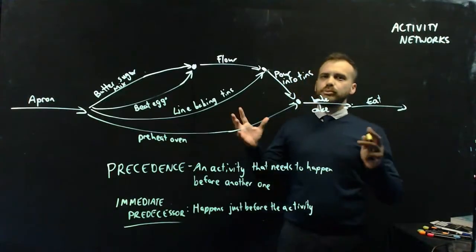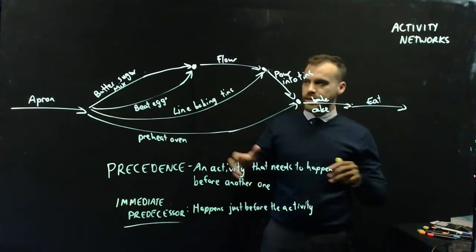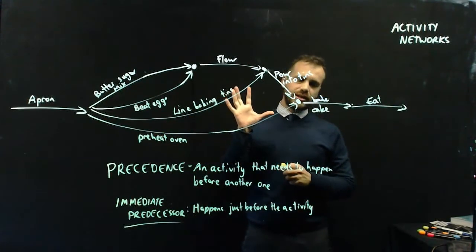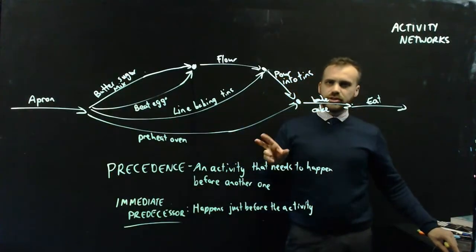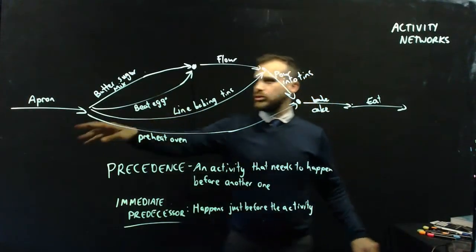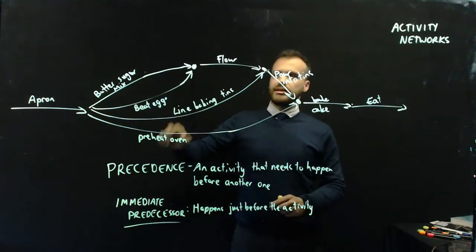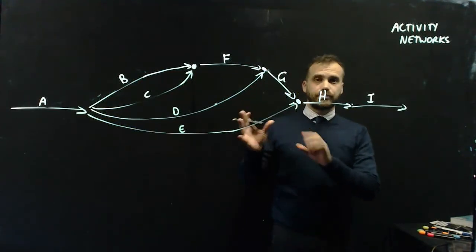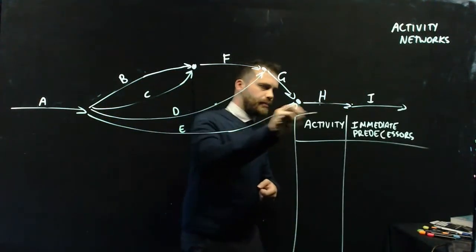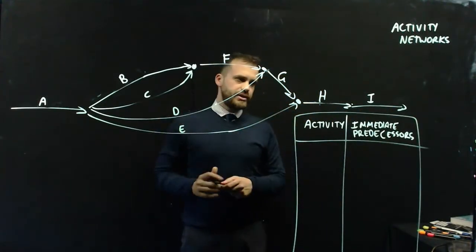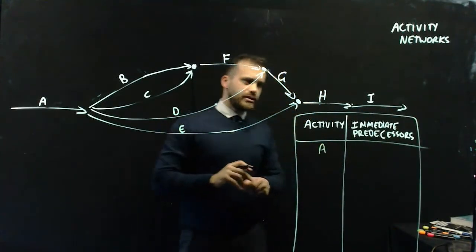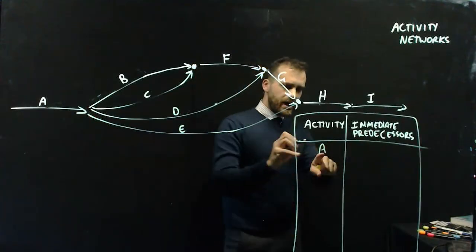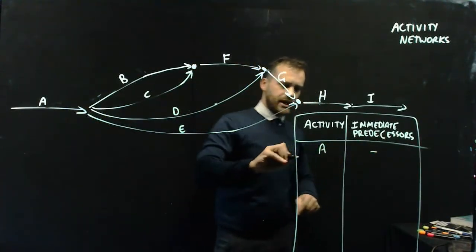In a much more complicated dish, like a MasterChef recipe, this network's going to get really crazy. We could actually interpret this in a table. I'm going to change all of my apron, butter, sugar to letters, A, B, C, D, E, F, G. I'm going to create a table called a precedence table. Let's put in all of our activities. Activity A. Does anything have to happen before A happens? No, A is the first thing to happen. A has no immediate predecessors.